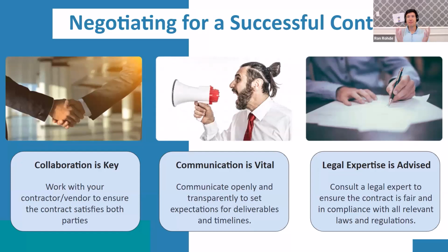Those are 15 different time points that if the contract doesn't require, or at least loosely say, you must update me every 3 or 4 weeks, if it doesn't say that, I almost guarantee they're going to do the bare minimum, even if they are good people and even if they are going to do a good job. It's very stressful to not have updates. And so anybody that's done some construction will tell you that's a pain. You've got to update the people.